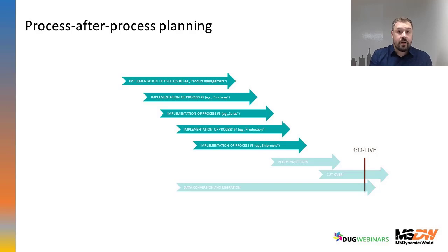Without an existing product, or item in terms of Business Central, which I create within product management, I cannot purchase, I cannot sell, I cannot see anything on the eShop and so on. So product management should usually be in the first place.